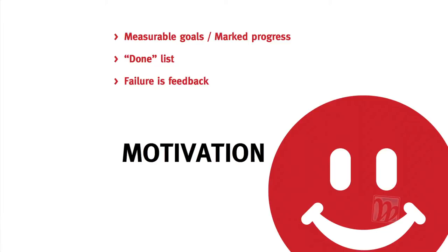Have measurable goals. So one of the things I use is I have Harvest. It's a time tracking application. They have budgets, like you can either do time budgets or money budgets or things like that for different projects. And I'll set up actually even the different individual tasks within it. So I have a task of like code and build. There's another task that's launch. And I've identified when I'm launching a website how much time those things take. So whenever I look at Harvest, I immediately can see like, wow, I'm almost done with that project. And I've gotten all these aspects of it done.